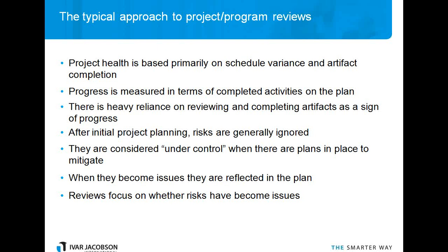So these risks, as you're working with them, are considered to be under control in the traditional approach when the plans are in place to mitigate them, as opposed to when they've actually been mitigated. So when those things become issues, they're reflected in the plan again. There's a re-baseline of the plan, and the measurement against the plan continues. So the reviews tend to focus on whether risks have become issues and whether the project team is adhering to the plan. So let's talk about what the problems with this are.